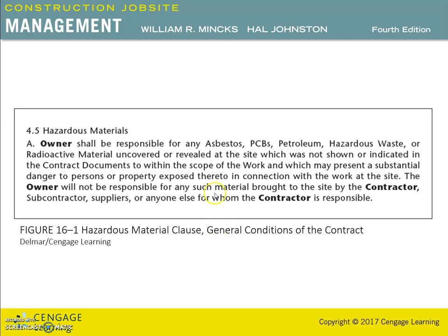So in this case, the contractor would notify the owner of any discovery of hazardous materials as described in the specification. The owner then needs to decide on the best way of handling the material. A change order might be written to the contractor to remedy the problem.